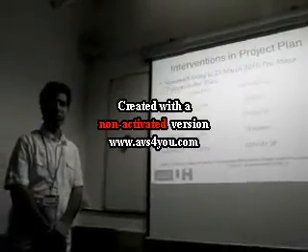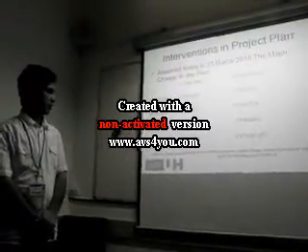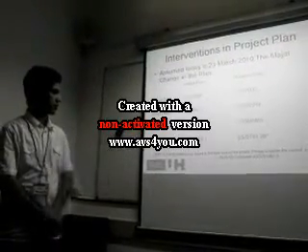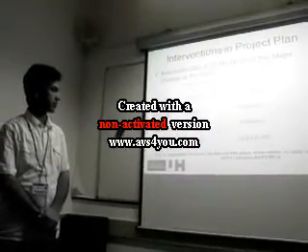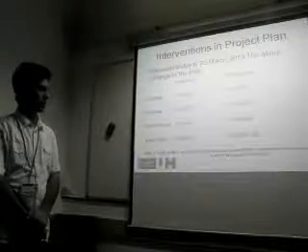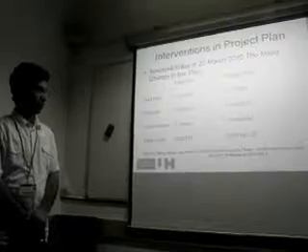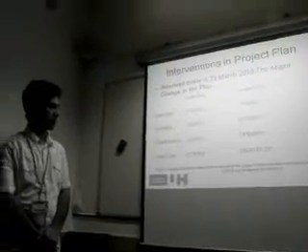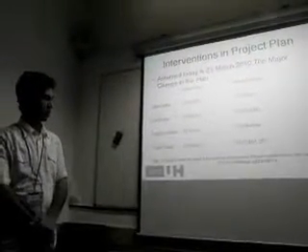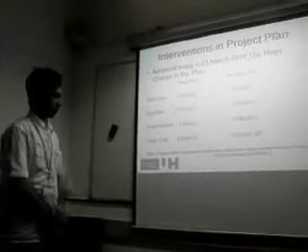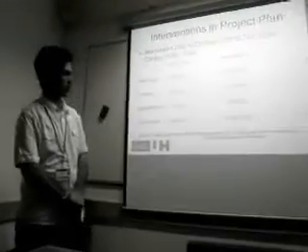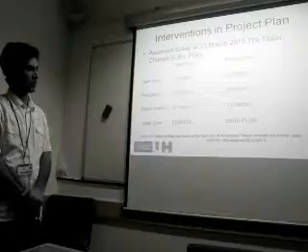So the total duration comes to 19 months, and definitely the cost is also changed, because the total cost according to the old plan was 2,36,172, and according to the revised plan it is almost double, which is 5,70,181. Just one thing, I made a typing mistake in the summary report you already submitted, so please consider the correct one. I do apologize for that. The correct value is 570,181.28 instead of 570,1801.3.